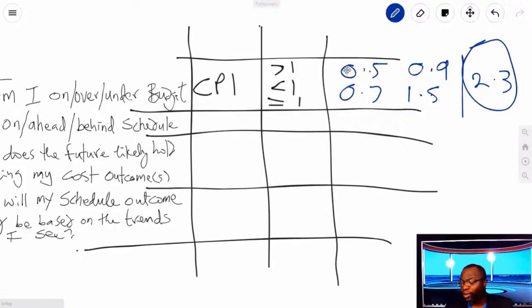Like in a firm I worked at, we had a situation where our CPI looked too good, and management said, Phil, you need to go look into this. So I went to look into it, and what did I find? I found out that costs were hitting the wrong charge number. That is what earned value management metrics can do for you. It tells you when there is something wrong. It's a signal to management that something is wrong and it needs to be looked into.